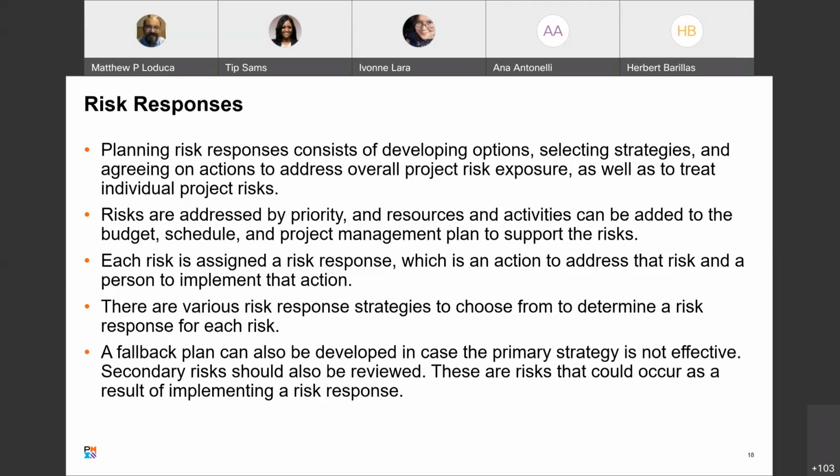And if you're here at AT&T and you can get multiple candidate solutions, that's great. If you can't, well, unfortunately I can't. I always ask, and I almost never get one. It's always nice to have, and most of the time we don't need it, but every now and then you do. So we want to have a fallback plan, and we want to have a fallback plan that doesn't rely on the same stuff that the original plan relied on. So these are some of the things we talk about when we talk about risk responses. Essentially, what are we going to do? Who's responsible for it? What's the threshold that triggers this response is what we're looking at.